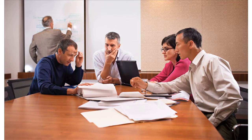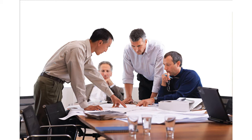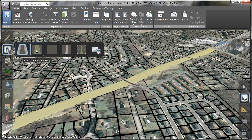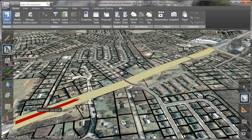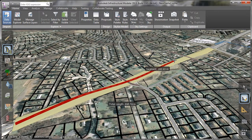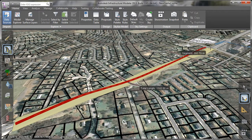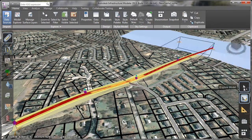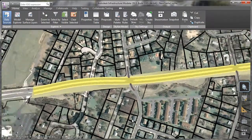In the early stages of an infrastructure project development, teams are typically working towards the creation of 30% plans that can be used to confirm scope, budget, and schedule. How can teams more efficiently generate quality comments and a solid understanding of design intent? The answer: workflows that combine the power of Autodesk Infrastructure Modeler and AutoCAD Civil 3D.